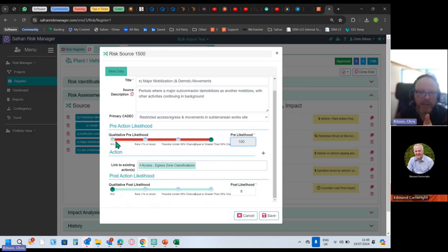But you can NA that and just say no, it's going to be exactly 8% because that's just what my team tell me, or this is what the data is suggesting that it is going to be. You might have historic evidence that says, well, look, this thing happens 8 times out of every 100 projects. You know, justify it.